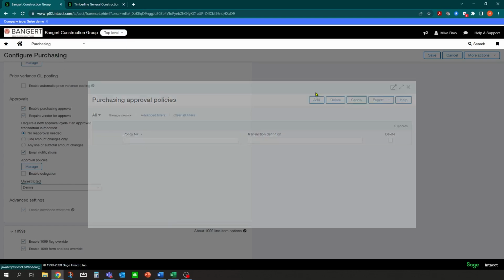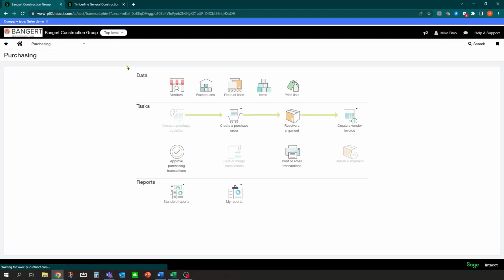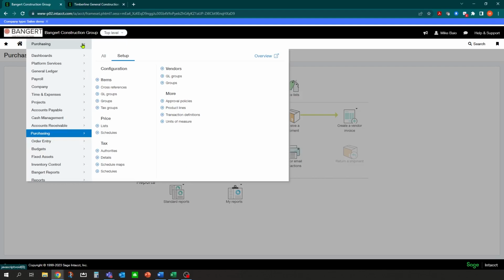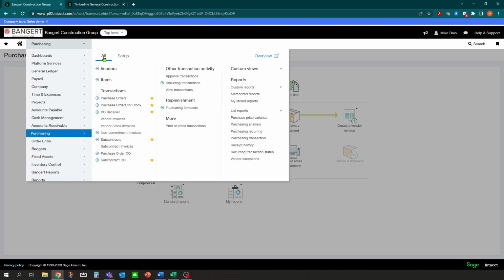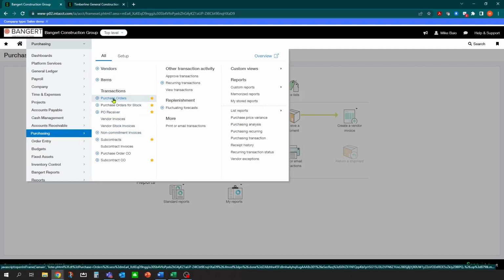So we're not going to turn any of these on right now. And the next step, let's actually set up a committed cost. We're in purchasing already. Now that we've got our budget in and our contract in, let's set up a subcontract. You can do a subcontract or a purchase order. You build these workflows and turn them on and off depending on what documents you need.